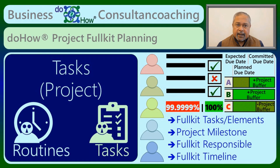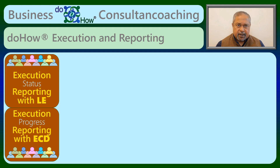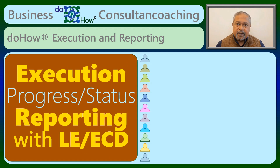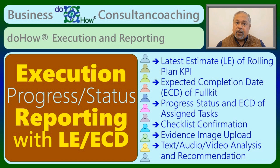The necessary routines and tasks for realizing the improvements are also identified. During and after execution, the progress status along with the latest estimate and the expected completion date is updated by everyone for the rolling plan and full kit respectively. The progress status and the expected completion date of the assigned tasks is also reported by everyone, with checklist confirmation, evidence image upload and an analysis of the current reality with recommendation. The reporting is mainly for the benefit of the others in the team.